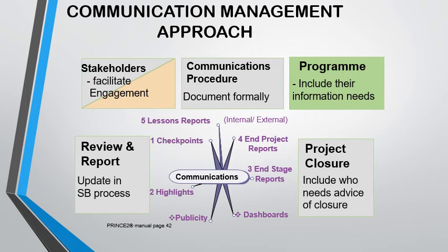This defines the communication format, the presentation format, the frequency, and other details of how communication will be handled, the reports we're going to be using, the presentation scheme, whether we're going to be using dashboards, emails, whether you're going to be sending smoke signals, all those details will be mentioned in the communication management approach.